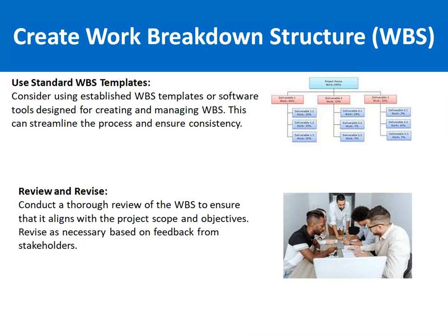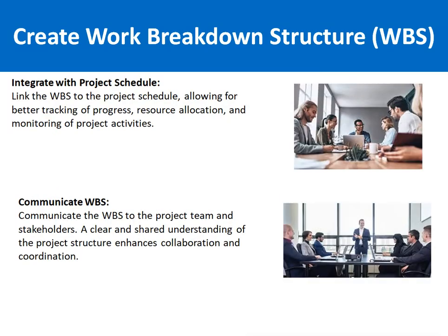Then conduct a thorough review of the WBS to ensure that it aligns with the project scope and objectives. Revise as necessary based on the feedback from stakeholders. That means you will check the scope documents, you will check the objectives, and make sure that nothing is missed out in the WBS, because if anything is missed out in the WBS, it will be missed out from the whole project.